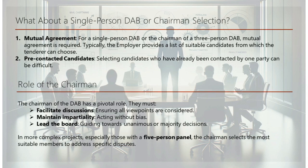The chairman of the DAB has a pivotal role: they must facilitate discussions ensuring all viewpoints are considered, maintain impartiality acting without bias, and lead the board guiding towards unanimous or majority decisions. In more complex projects, especially those with a five-person panel, the chairman selects the most suitable members to address specific disputes, helping maintain the board's effectiveness and impartiality.